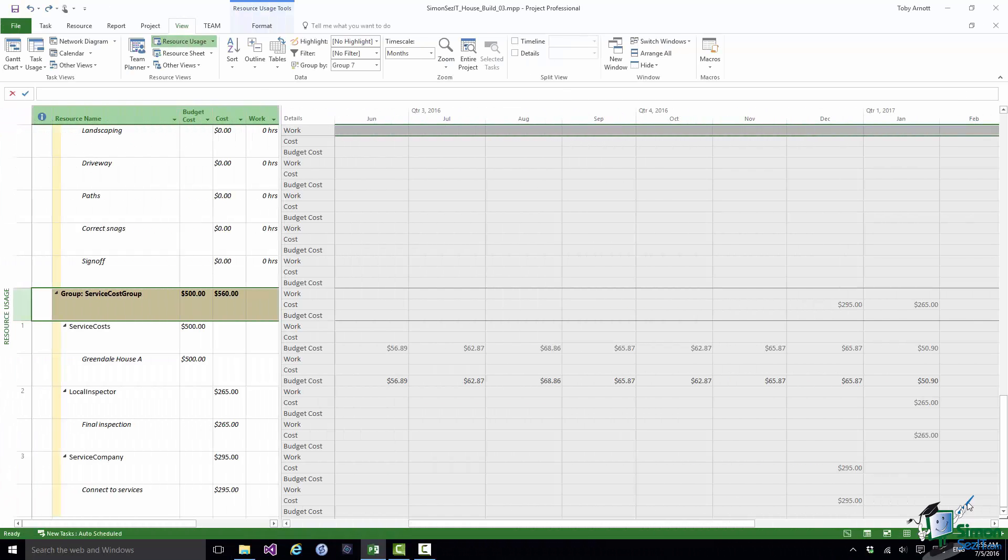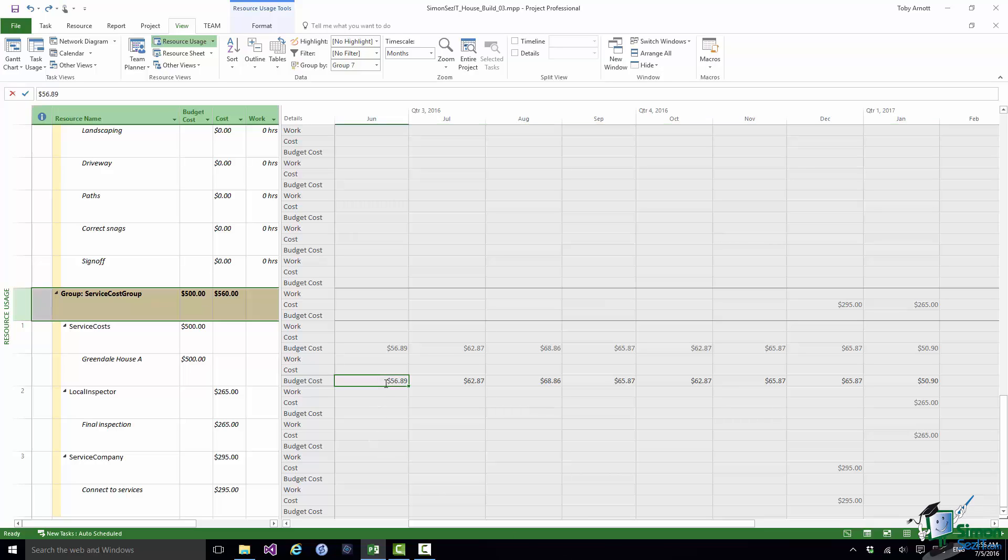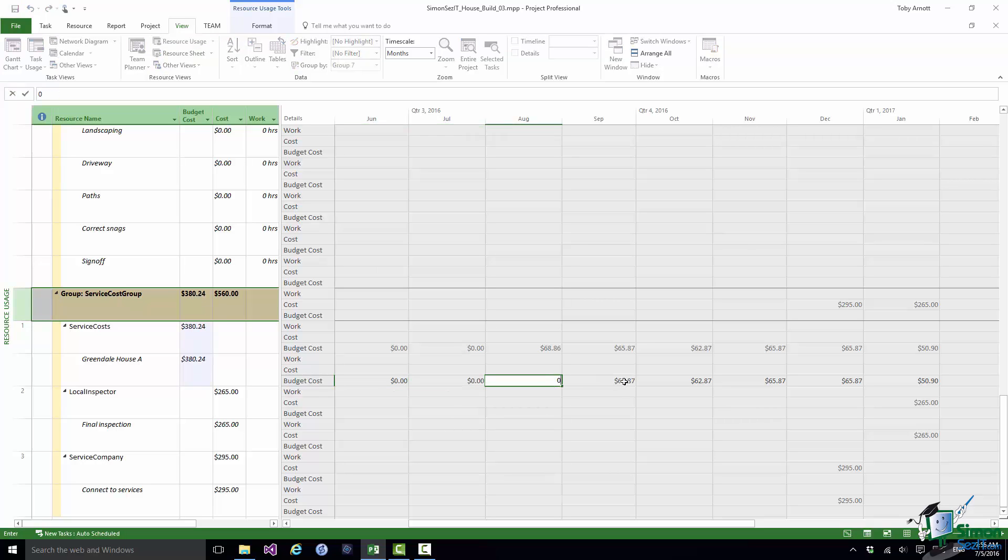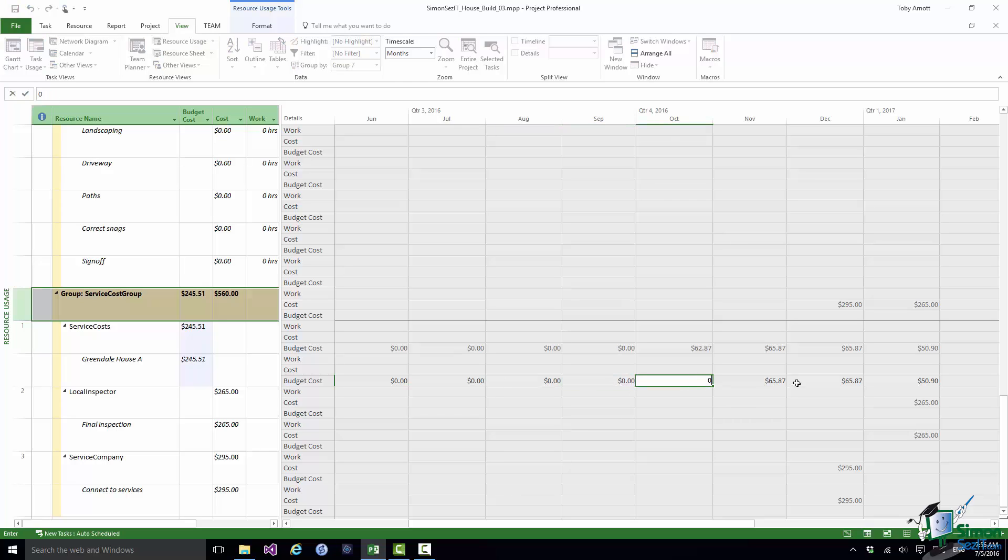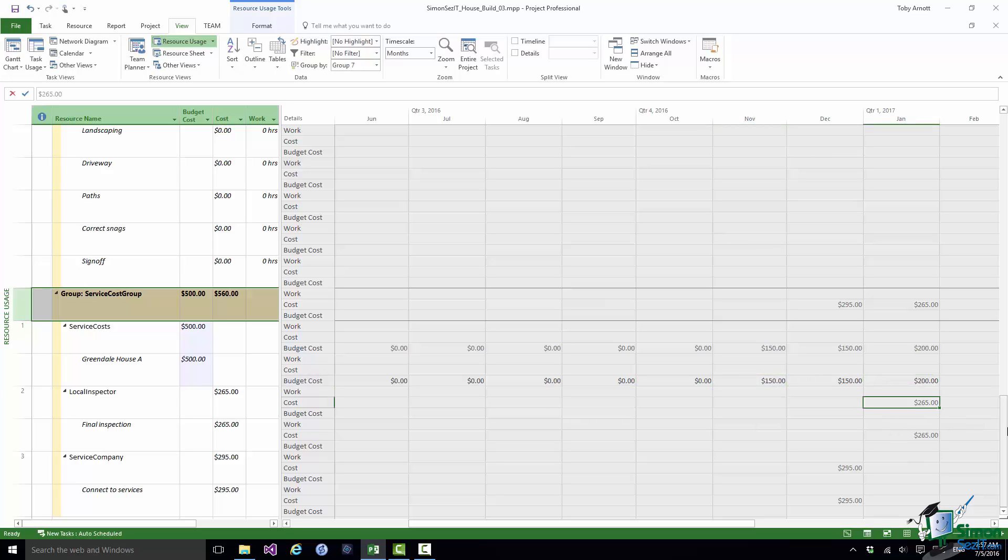So if for example when you set up the budget cost in the first place you knew that the distribution of spending that money would be that it would be towards the end of the project you may do something like change the budget cost distribution. Note the total being changed in the table on the left there. You might have guessed in the early stages that the budget would be more like that. Note that I'm back to my $500 total but I've sort of back loaded it. I've put in a profile for that budget cost and that will avoid the situation where I appear to be underspending on service costs because I know that I won't be incurring those costs until later on in the project.